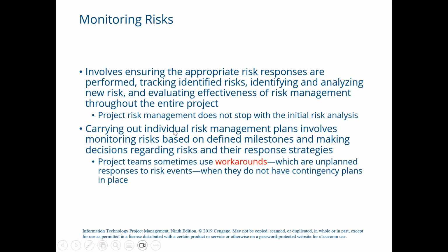Carrying out the individual risk management plans involves monitoring risks based on defined milestones and making decisions regarding risks and their response strategies. Project teams sometimes use workarounds, which are unplanned responses to risk events when they do not have contingency plans in place.